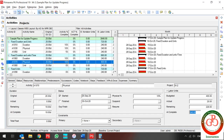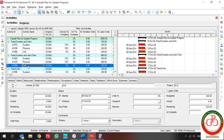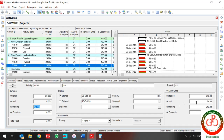What if I change my activity percent complete type to Unit, with duration type Fixed Duration and Unit? If I update my activity to 10%, my actual labor unit updates and the software calculates actual as 24, and remaining duration updates too. But if I change the remaining duration, considering my percent complete type is Unit and duration type is Fixed Duration and Unit, the done work changes because I affected the work.